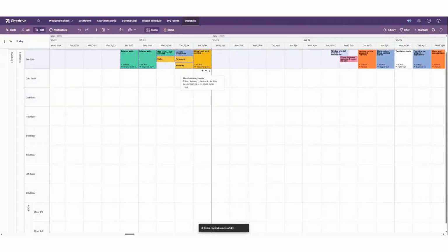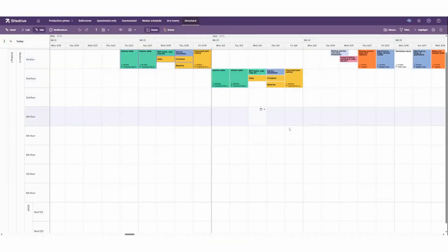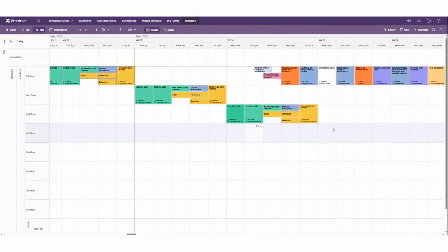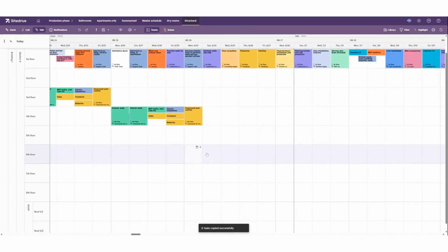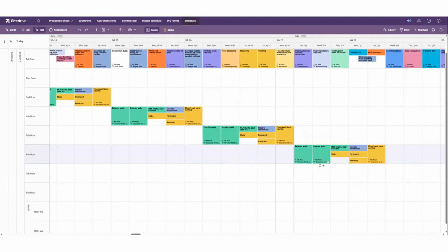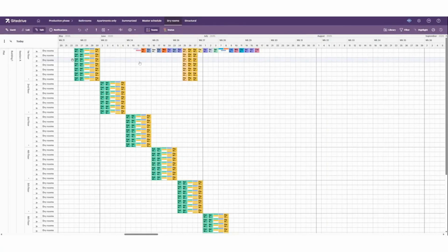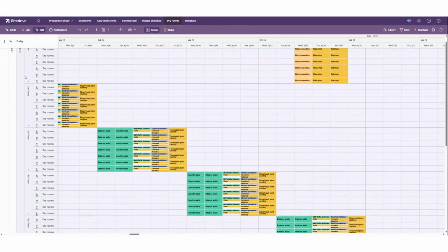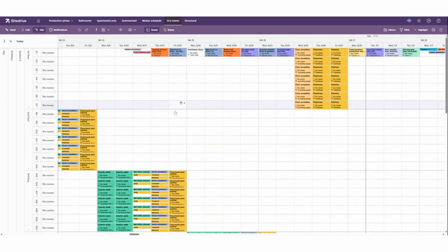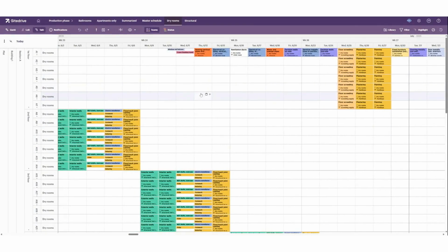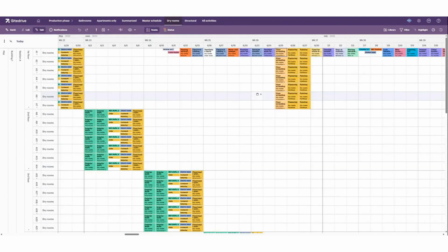Here we have a typical sequence for a precast concrete frame. And because everything looks correct, we can just start copying these tasks to the next floors. Now we can move on to scheduling the apartment-specific tasks. In this view, we can see all the tasks that were assigned to these locations earlier. Now the next thing is to really build up the floor-specific sequences and to copy them to subsequent floors.